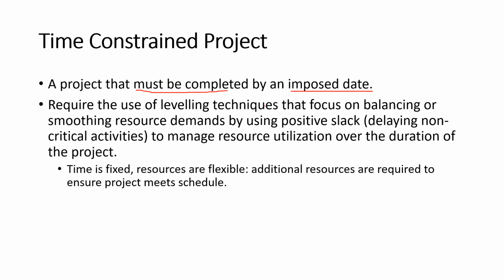It requires the use of a leveling technique. We are going to level our resources, focusing on balancing or smoothing resource demand. We are going to balance or smooth our resources by using positive slack. If we have positive slack, those activities are non-critical activities, so we can delay them to manage resource utilization over the duration of the project.